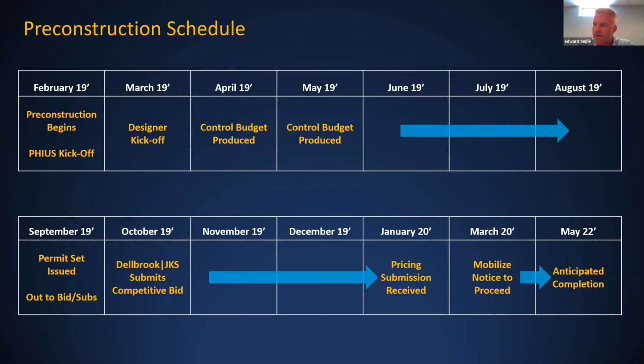But for this job, the baseline budget was high enough, as I'll go through in the cost estimating. It was a key piece, because ultimately we landed on 1.5 to 2 points of cost, which was roughly $600,000 to $800,000 on a $50 million job. So if the baseline budget wasn't where it needed to be with respect to HVAC design and other things like that, I think the delta would have been different.